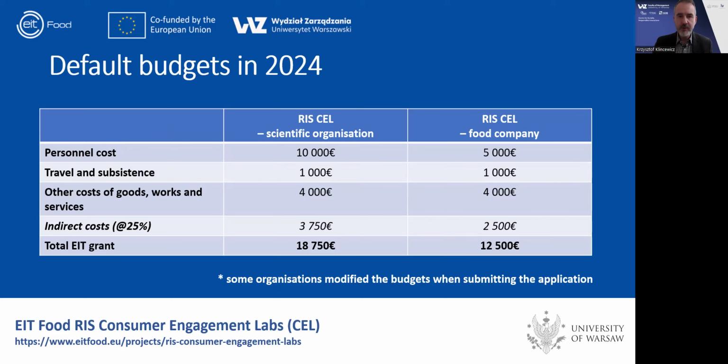And unfortunately, now we just have to stick to the budgets that each of you declared. Those budgets are going to become part of your grant agreement, and at least for several months, you will have to follow them. We have some concerns about certain cases because some organizations substantially decrease the budget for travel, and it might just not be sufficient to cover the cost of a project meeting if we decide to hold it, for example, in Brussels.